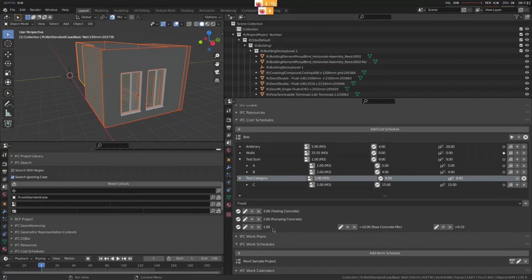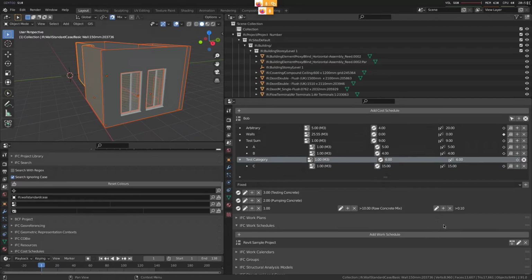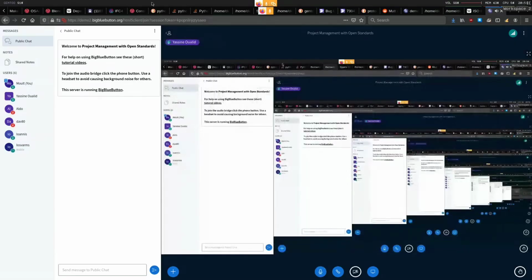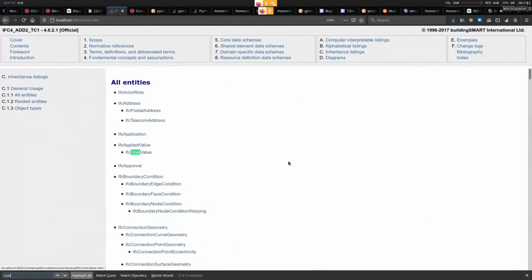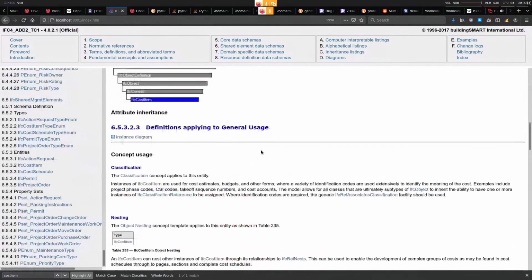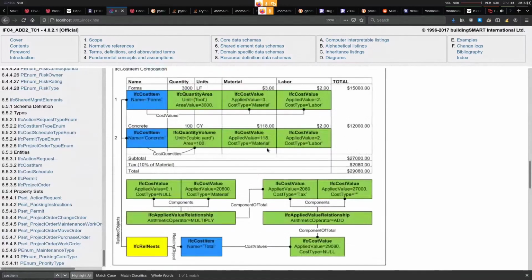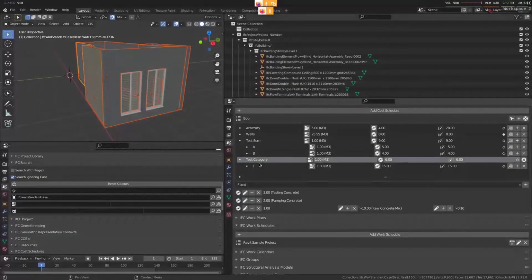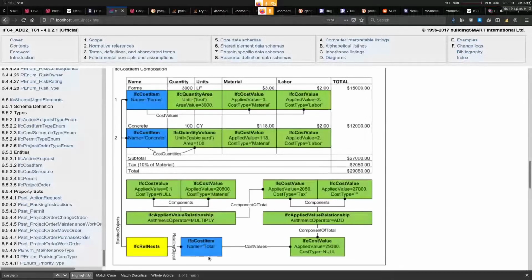So you can see what it's done is taken 3 plus 5, and said, by the way, now we're going to have this multiplied by this, which is equal to 1.6. I did this kind of differently. If you pull up the example from the IFC schema attached, you would see that it's the root task with the calculation, not the cost items themselves. It is the parent cost item here.